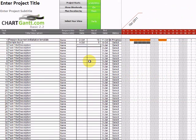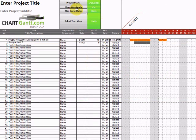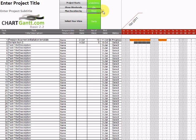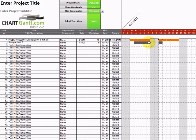Number 1. Planning in days or work days. Up here we have planned duration by days which includes 7 days of the week. So what this is doing is determining the use of this particular number. So 5 work days crosses a weekend for example. So there you can see 5 days is being shown but it's automatically scheduling around the weekends.